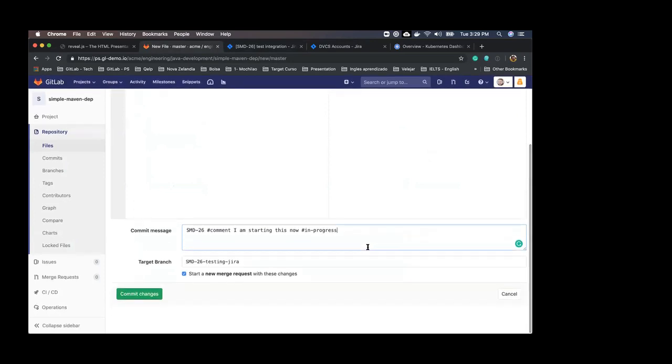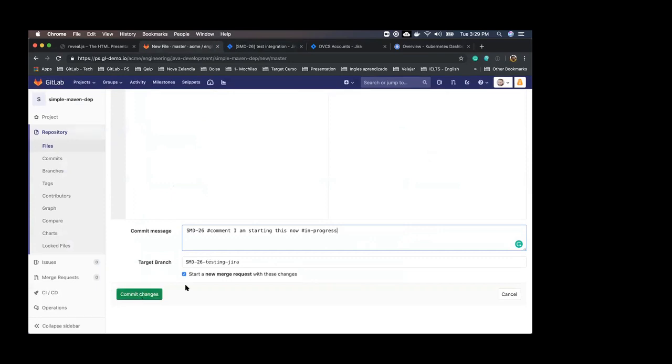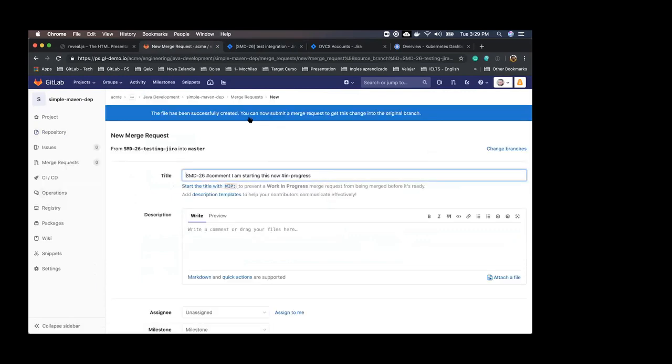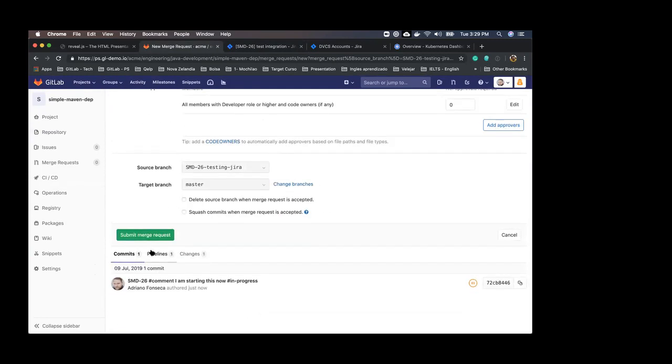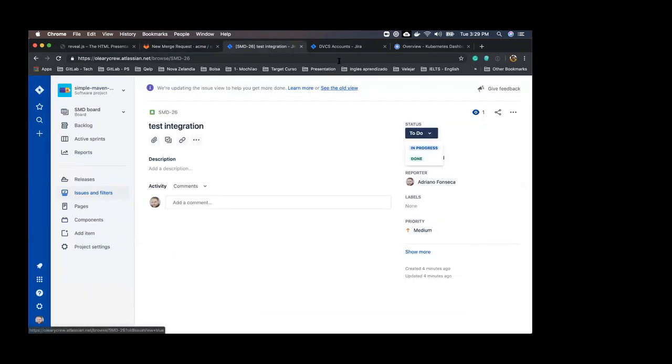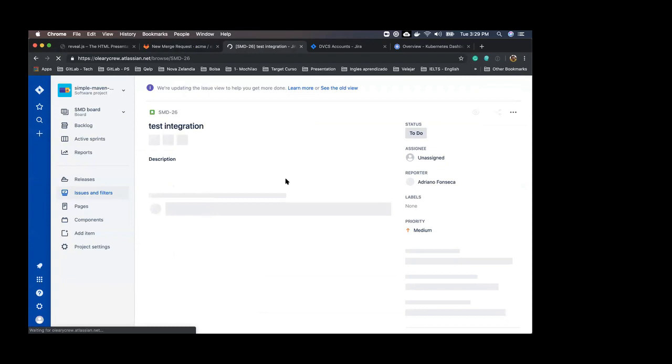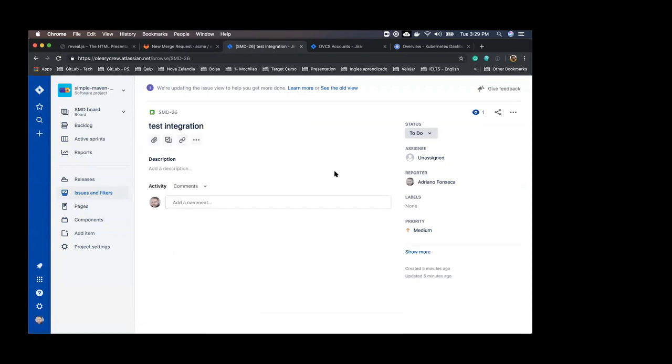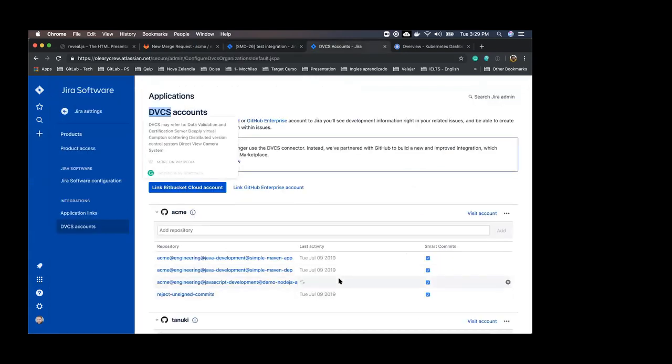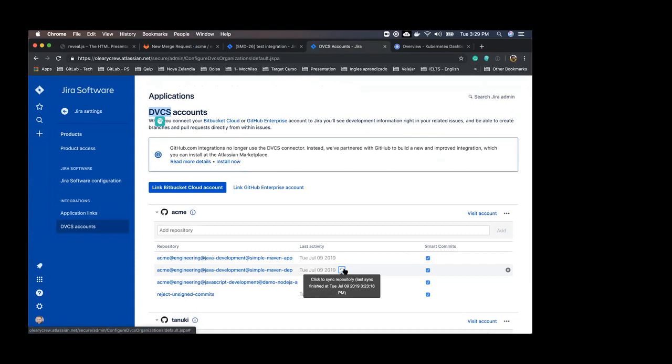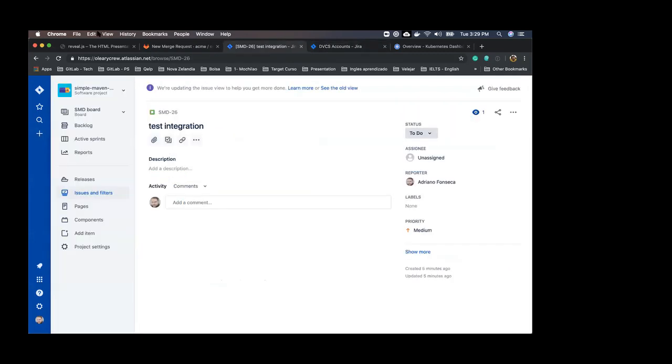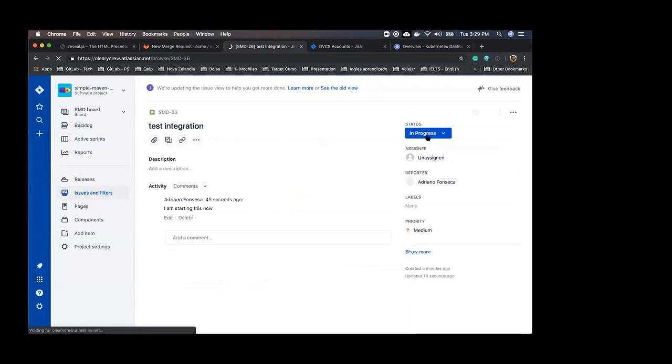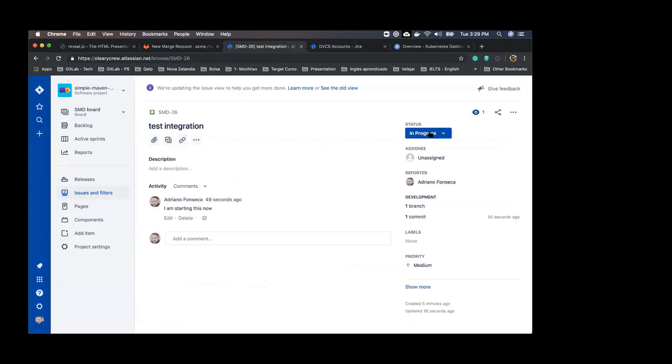For now that is what I want to do. I'm also saying that I want to start a merge request. I will do the commit first and then some things already happened here. I have a new branch and I have a commit done. So if I go in Jira and I refresh here, let's see. It didn't update and this is because Jira will hit the GitLab API on a timer. What I can do is to force this synchronization to happen right now. I'm basically syncing Jira with GitLab and then once this is complete hopefully we'll see our commit, branches, and the transition happening. Okay, so let's refresh, fingers crossed. Yes it's done, so it's here in progress. I did the transition.